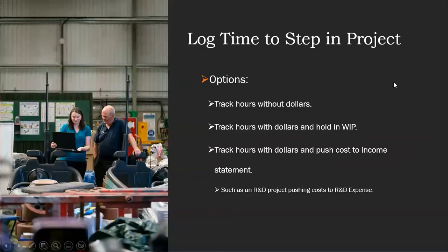We can log time to the steps in the project. And we can track it with or without dollars, which is pretty much your preference. As I mentioned too, we can also hold the cost in work in process if that makes sense, or if it doesn't, that can be pushed right to the income statement.